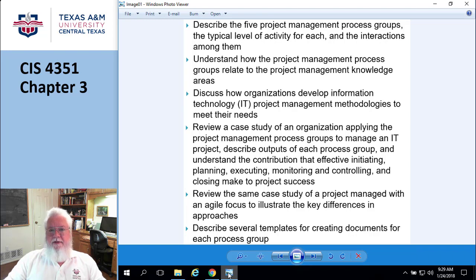Monitoring is typically concurrent. This is not like the waterfall model. This is not like step 1, step 2, step 3, step 4. This is not at all like that. Monitoring is all about, let's make sure we're accomplishing what we said we're going to accomplish. So there's continuous monitoring all the way back to planning, execution. Monitoring is not tacked on to the end. So this is where you measure your success, so to speak.